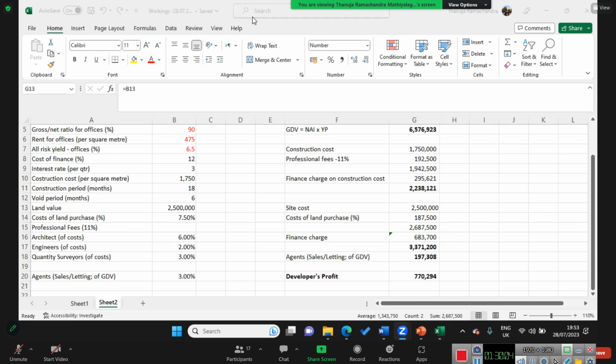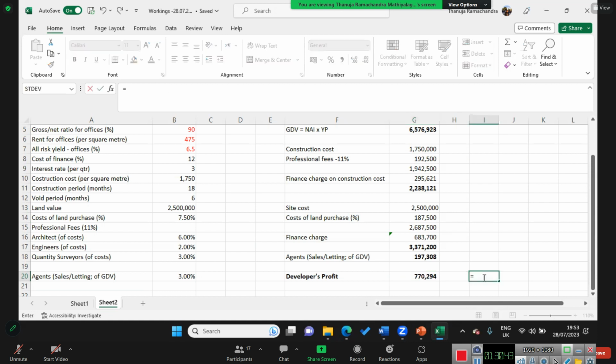Okay, so in this case, simply see this 2.5 million or 1.187. These totals are at two different times. Are they equal? So when we take this 770 to add it with this one, subtract it from that one, or compare, we need to adjust it, no? Ideally speaking, this is a profit after 2 years. And what is its value now? So we need to discount it.